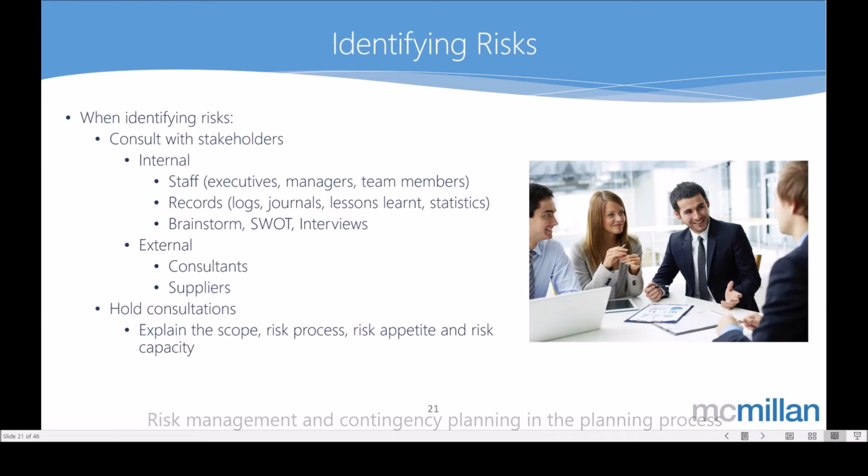So we might find from some type of journal or lessons learned the last time that we had a software upgrade that these are some of the things that went wrong. And we can learn from that and help that feed into our risk assessment, our analysis of our plans. And we can also consult internally through things like brainstorming, SWOT analysis, which SWOT is strengths, weaknesses, opportunities, and threats, or just interviews with key stakeholders, internal key stakeholders. Like I said, team members, executives. It could be people in other areas, multidisciplinary teams, and so forth.